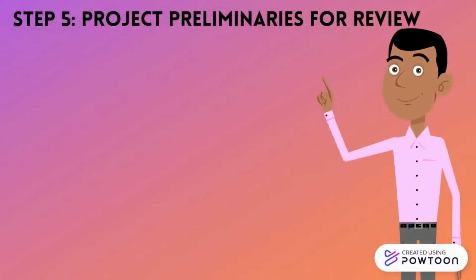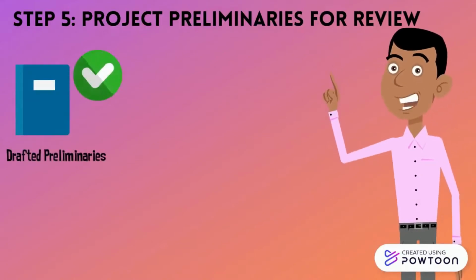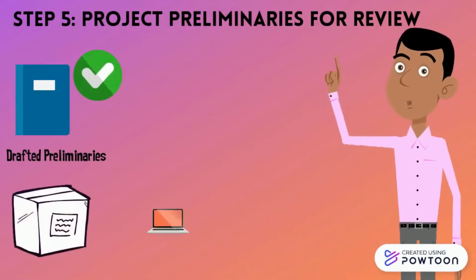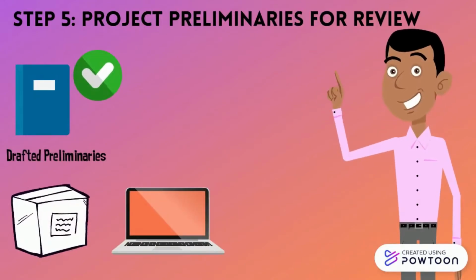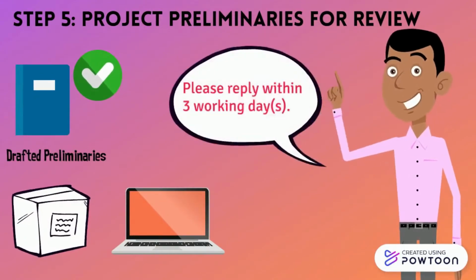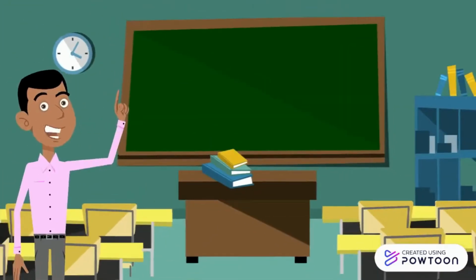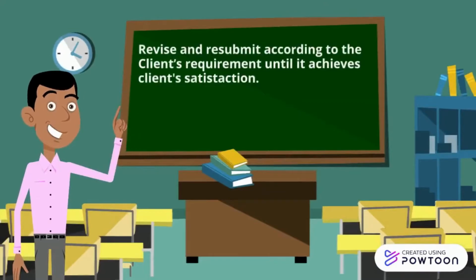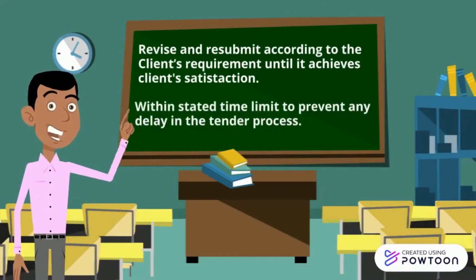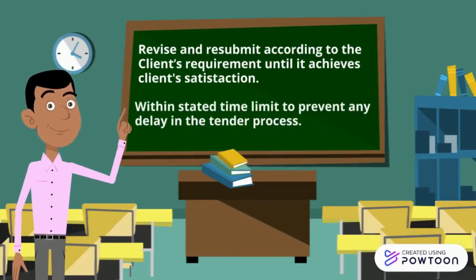Once the project preliminaries has been drafted, QS consultant shall submit it to the client's team for review through post or email. It is suggested that the client shall reply within 3 working days upon receipt of drafted project preliminaries. The information shall be available to revise and resubmit, according to the client's requirement until it achieves client's satisfaction within the time limit, to prevent any delay in the tender process.